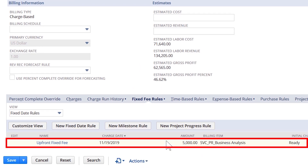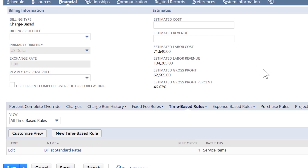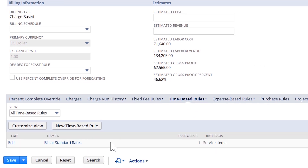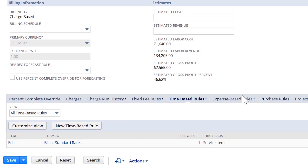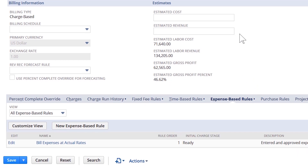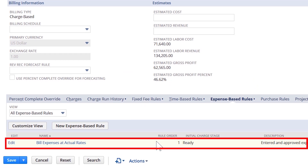We can see that we invoice our customers $5,000 at the beginning of the project. Then under our time-based rule tab, we have included the billing rule that will capture all resources' billable and approved time to this project. And lastly, under our expense-based rule tab, we have a rule that will capture all entered and approved expenses input against this project.